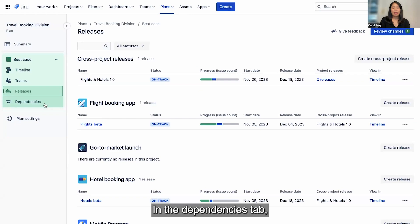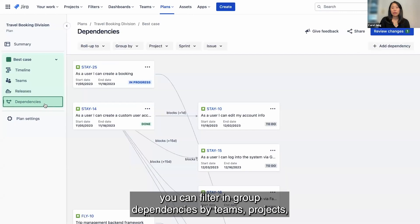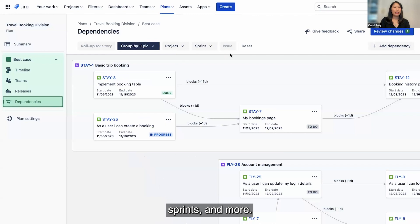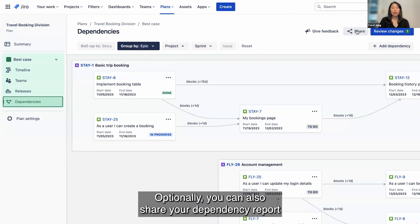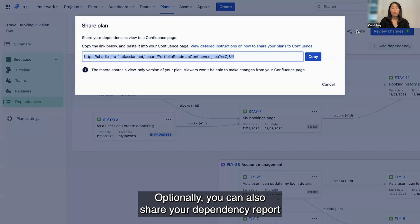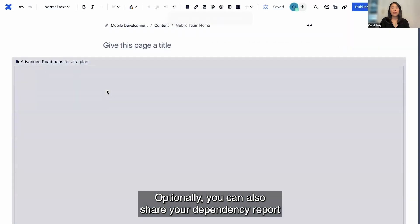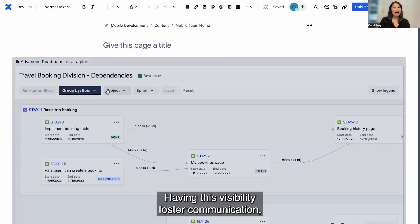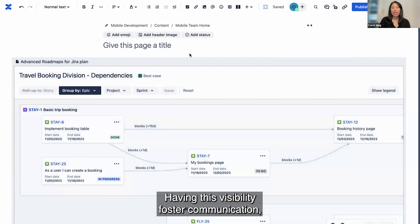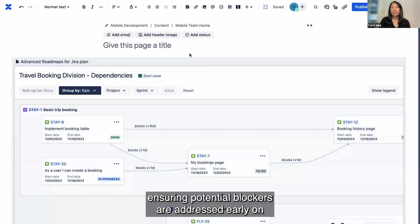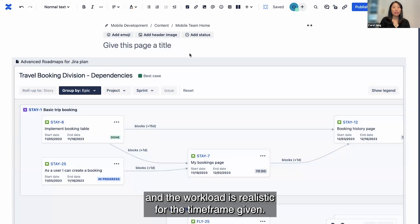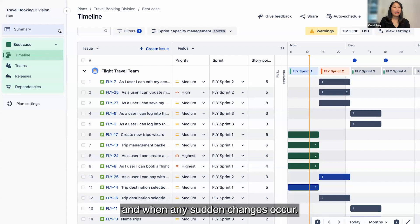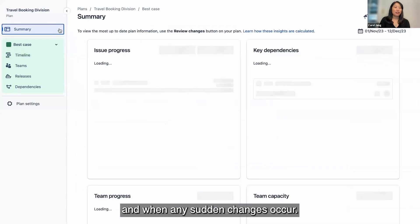In the Dependencies tab, you can filter and group dependencies by teams, projects, sprints, and more. Optionally, you can also share your dependency report on a Confluence page. Having this visibility fosters communication, ensuring potential blockers are addressed early on and the workload is realistic for the timeframe given. It also helps maintain alignment as the plan progresses and when any sudden changes occur.